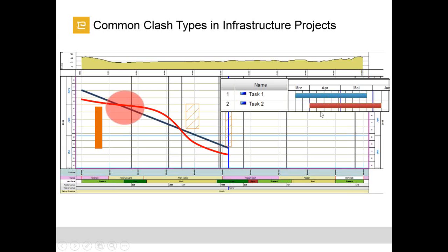Everything looks fine, we have no clashes, but indeed we can easily understand in TILOS, because TILOS also shows the speed. So here you see that this activity is fast moving, and this one in some parts is changing its speed, sometimes fast, sometimes slower, which causes clashes at 2 points.